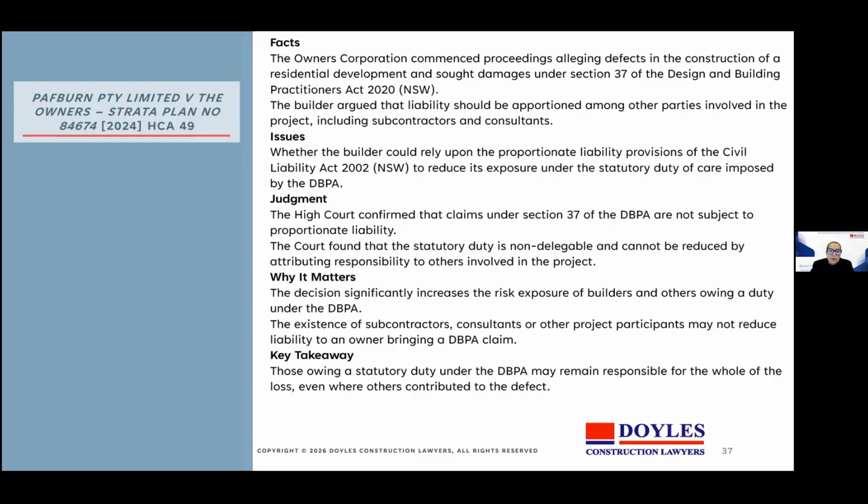And the High Court confirmed that claims under Section 37 are not subject to proportionate liability. It found that the statutory duty is non-delegable and cannot be reduced by attributing responsibility to others involved in the project. Pathburn is the landmark. Section 37 isn't subject to proportionate liability, so a duty holder can be liable for the whole loss, even where others have contributed. And it's one of the most significant DBPA decisions to date.